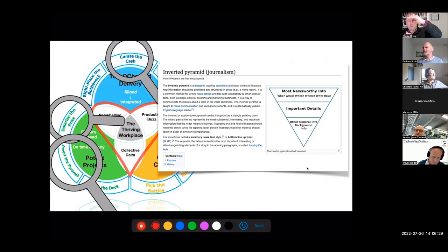for when they're going to put that article in, and then they go, oh, we need to chop it down. So they just chop it wherever. And so long as they've got that first paragraph, and ideally maybe the second one, then they've got the essence of the story there. And the inverted pyramid is essentially the project management mechanism that comes with Agile for free. And it works on product teams or teams that are just set up to do projects. Works on both. And you might even know that as variable scope, fixed date kind of arrangements, but it's far more elegant than that makes it sound.